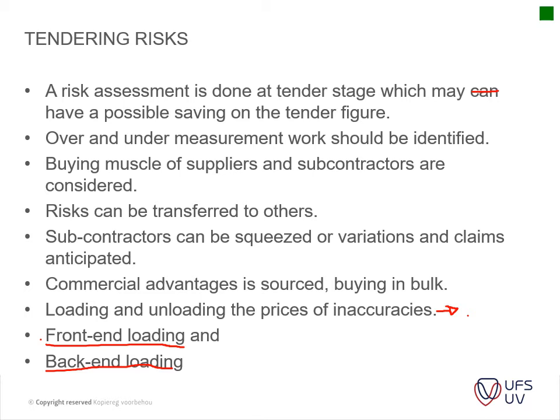If you anticipate that that will actually assist you, if you can perhaps get certain items at a better cost, it might benefit you to load some of your items at the end of your project, or when you foresee that your cash flow might be low at the end of the project, you can load some of the items there.